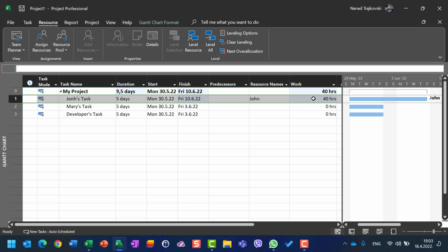But those 40 hours, how is it so? You can expect that John should work only 20 hours. And you can get that, but when you use Microsoft Project as is, by default, if you didn't make any changes, which I'm going to explain in some of my next videos, then you will have a calculation of 5 days.